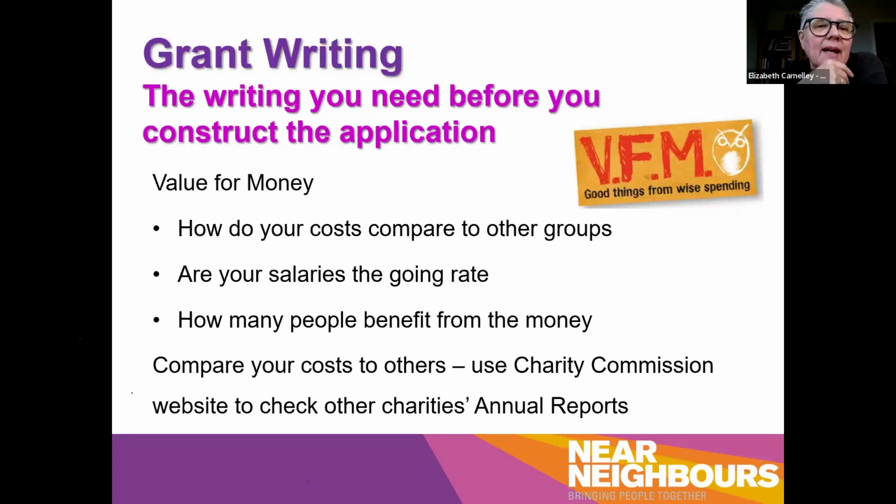So value for money: how does your cost compare to other groups? I mean, no point saying you're going to pay for a venue that costs £1,000 if you're in Blackburn, but if you're in London, then £1,000 is perhaps what it costs to hire a big hall for a day. Are your salaries the going rate, or do they seem ridiculous? And how many people are going to benefit?